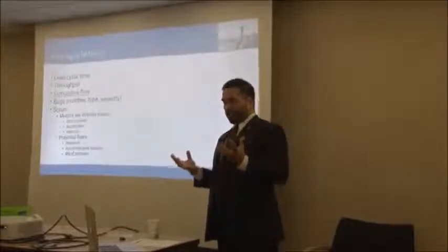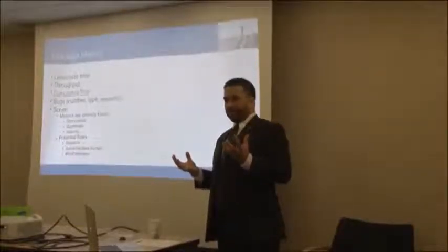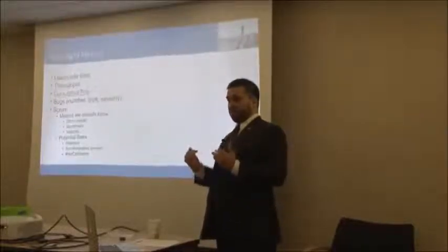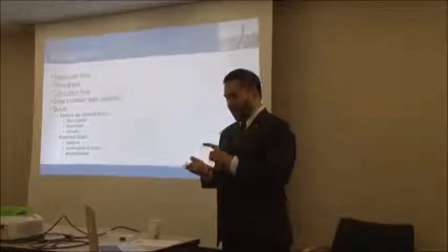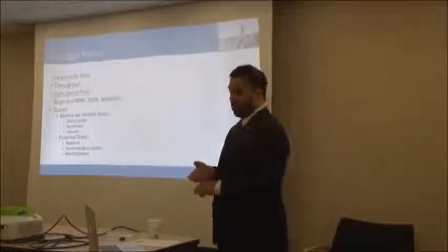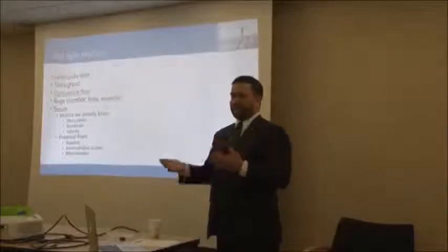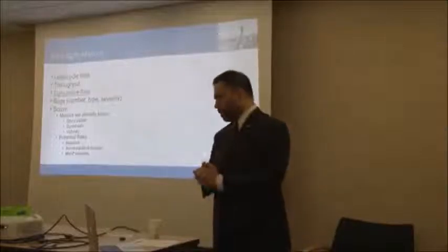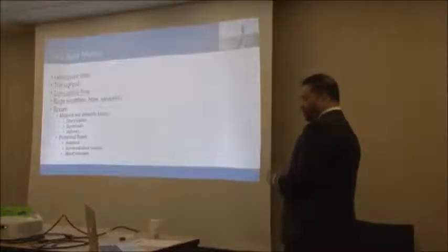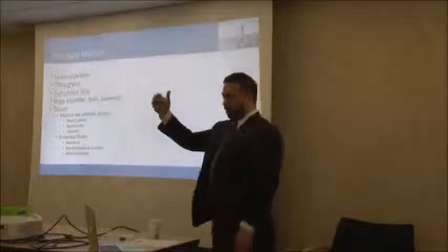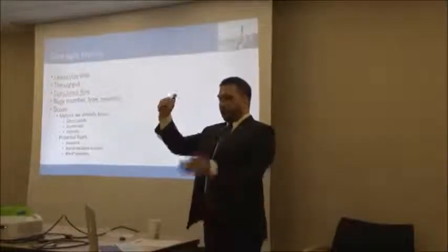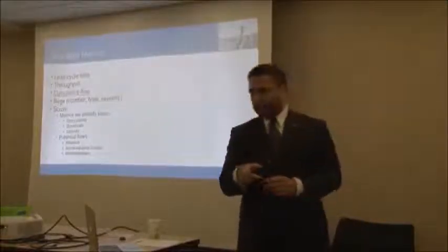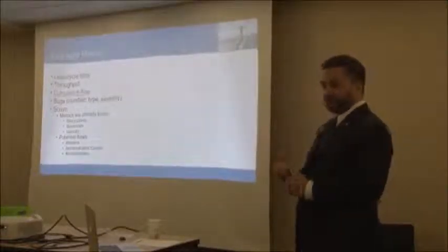Right, so it's kind of a fudge number, right? We've talked about this. There's nothing precise about it. It's meant to reflect the relative difficulty of something, considering the effort it'll take, the risk it entails, the value it offers, and it's team by team. What one team considers easy, another team might consider hard because of their experience. And related to these are burn down and velocity. Burn down meaning how much you have left, and you want to track how much you have left versus how much you've accomplished. And velocity, which is Scrum's version of throughput, which is story points per sprint.